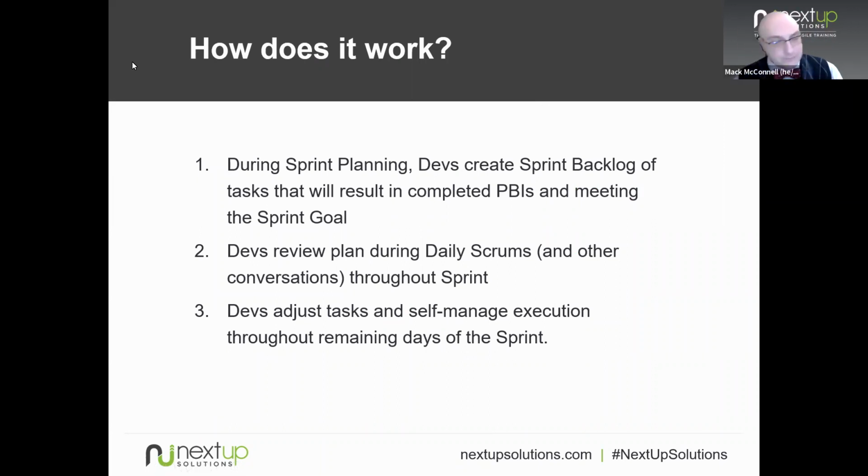All right. So during the 3rd discussion of sprint planning, that's mostly just among the developers. What they're going to do is, after the first 2 discussions of sprint planning, the why and the what, the team knows which backlog items we are going to try to get done. At which point the developers can move into the how discussion, where they're going to break those backlog items down into very small, concrete, finite tasks. Typically things that would take less than a day.